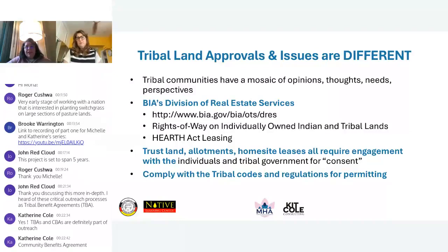And then socializing your project and talking with the planning department, or if it's the attorney. Again, every tribe is different, but the first thing you should be thinking about in terms of alignment with your community plan and your outreach is where you're going to site the project. If you want to have the tribe approve it and it's on tribal reservation land and you have to go to the tribal council, the land status is important.